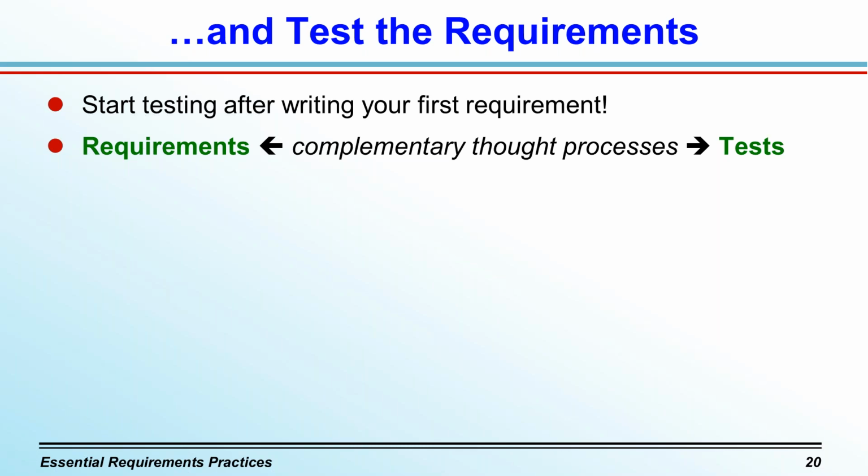And then after writing tests, I would walk through them against the requirements to make sure that every test could be performed by firing off certain requirements. Every time I did that, I found errors. I might find missing and erroneous requirements, missing and erroneous tests.